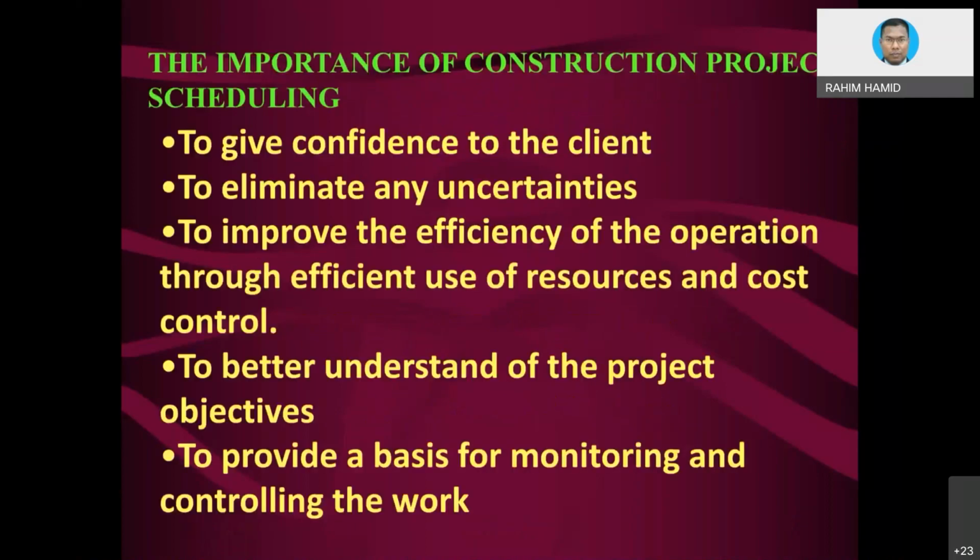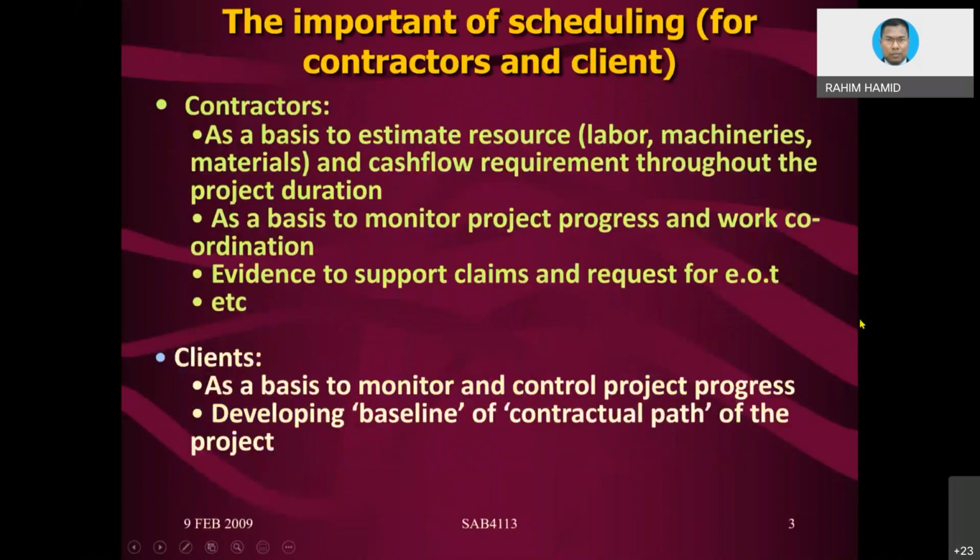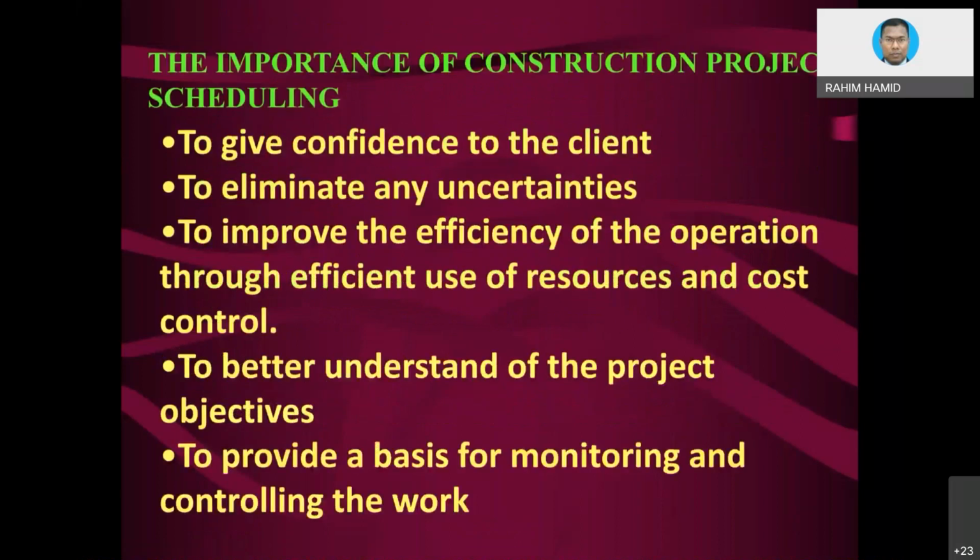The importance of construction scheduling. We already mentioned many in our introduction. For sure, here is an additional one: to give confidence to the client. That's why during tender you are asked to submit the CPM diagram, in order for the client to look at whether you understand what things you are going to construct.